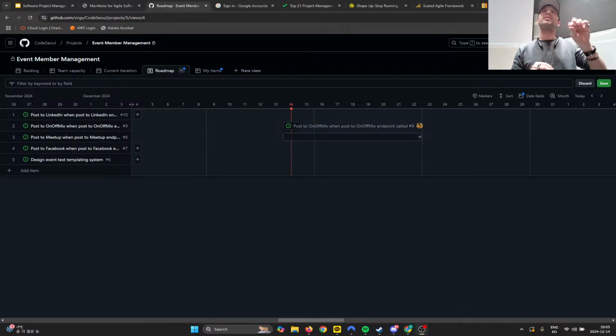Although, one thing to be careful of is do not use your task management system as where you record decisions of record, because it's good to figure out when the decision was made and by whom. But when people are searching for decisions that were made as documentation, they're not going to search the task system. So this is one big advantage that Atlassian has: the connection between Jira and Confluence. They work very nicely together.